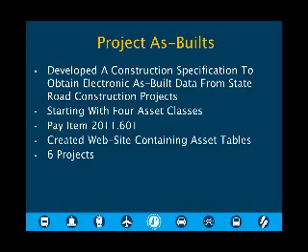By using external resources instead of internal to obtain as-built, we're able to reallocate our MnDOT staff to work on other projects. The contractor is also physically out there doing the work, so they can readily obtain the underground and above ground locations at the right time before the trench is backfilled, obviously. Having one pay item instead of asking for as-built as incidental means that we can track all of our project costs associated with construction as-built, and we can also hold payment until we receive the as-built data.